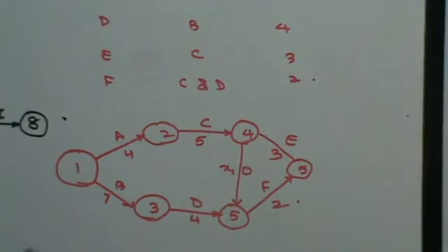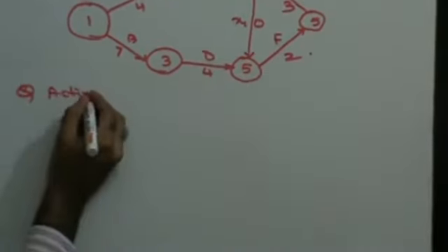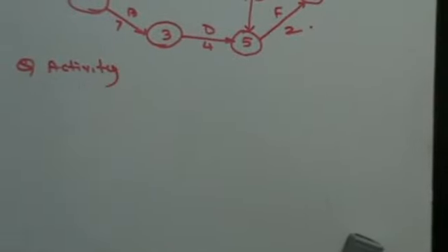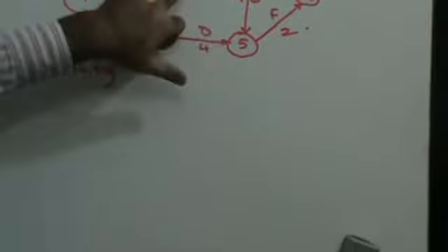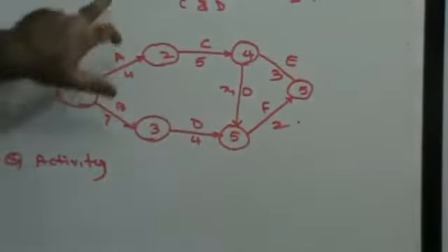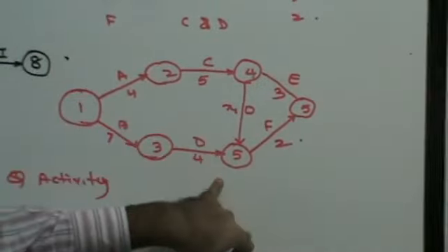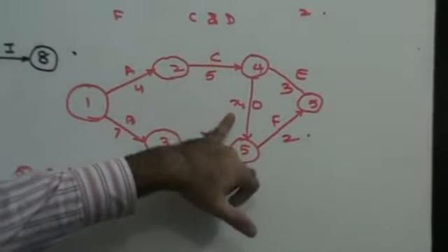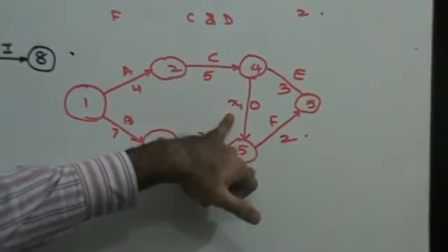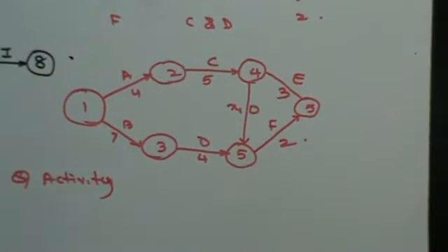Next, let's see another sum. Yeah, someone wants to ask me. Which one? This. C to E, then C and D. Now I don't have a link between C and D, so I made this fictitious link between them, and that's called a dummy activity, right?